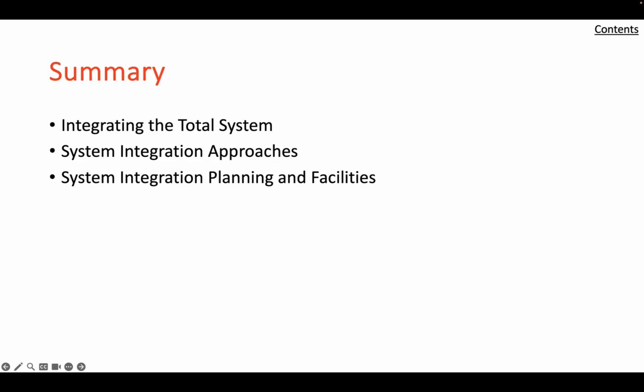The outputs of the integration phase are validated production designs and specifications, qualifications for the production and subsequent operational use. The activities constituting integration are integrating the tested components into subsystems and the subsystems into an operational system by sequential aggregation and testing of the constituent elements, and designing and building integration test equipment and facilities needed to support the system integration process and demonstrate end-to-end operation.